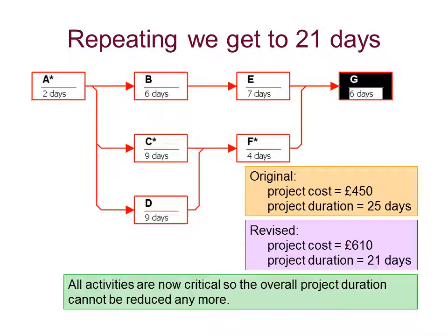A person might have a massive cost on the project to reduce the duration of an activity, but then they could reduce the activity by, say, 1 day or even 5 days. The cost slope itself can be critiqued because it assumes a nice, linear, smooth, incremental change in cost for savings.